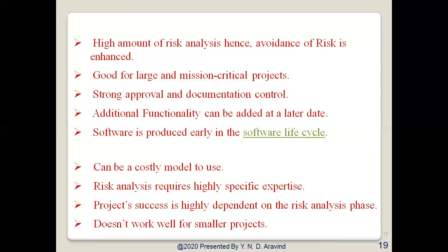And coming to the disadvantages, it can be a costly method to use. Risk analysis requires highly specific expertise. Project success is highly dependent on the risk analysis phase and it does not work well for smaller projects. It is a challenge to determine the exact composition of the development methodologies to use for each iteration around the spiral.